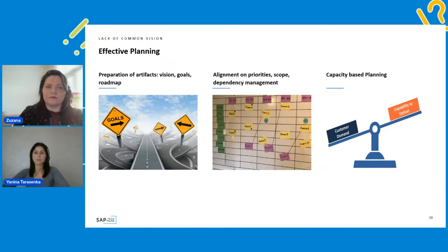In Agile frameworks, we have recommended processes, for example, in Scrum and in SAFe. So these are the teams who are making their planning. They always say what they are able to accomplish within, for example, a sprint, an iteration, or the PI, based on their estimations, assumptions, and experience. In the Kanban approach, we have a little bit different method. It's called the pull system, and it's implemented via the work in progress limits technique. This technique helps us to control the amount of work that the team may take into progress.